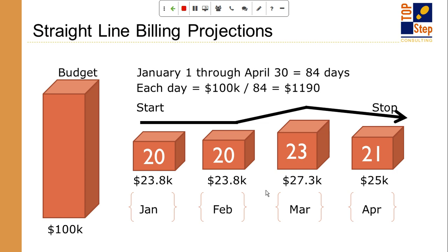And for companies who maybe haven't adopted resource scheduling yet in OpenAir, Straightline billing projections is still available because it doesn't rely on resource scheduling. And it's a nice initial way to do forecasting because you still get some kind of money value and you have an expectation of the delivery aspect of your capacity, so you can still do the basic forecasting and figure out your demand based on just the forecast capabilities of Straightline billing projections.